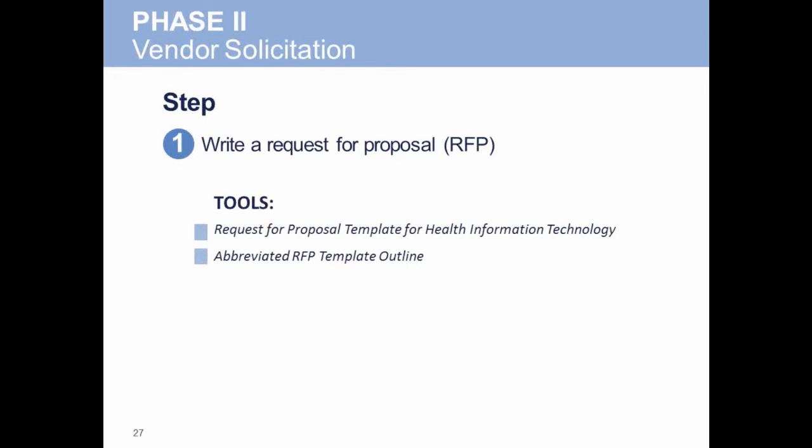Part 3 is the vendor profile and RFP and required information. This section provides the details on how a vendor needs to respond to the RFP, including the due date and mailing address. Request a clearly written vendor response covering information about their organization history and product details, including specifications required to install, implement, and support the EHR system.